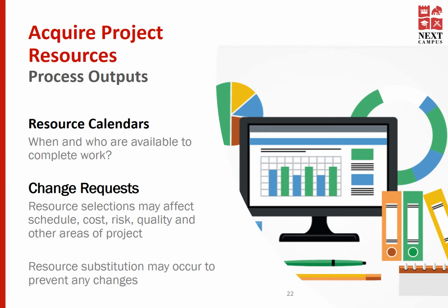Change request. Resource selections may affect schedule, cost, risk, quality, and other areas of the project. Resource substitution may occur to prevent any changes. A change request will be raised upon any major changes that happen to the resource needs.